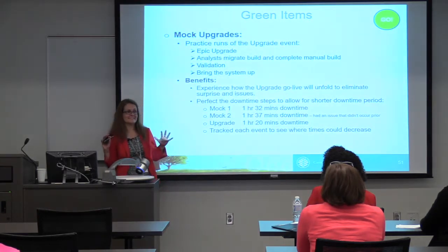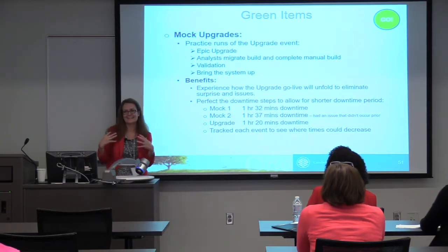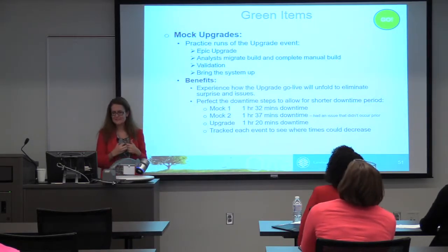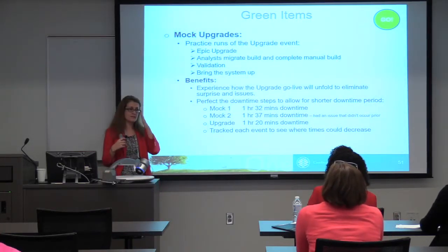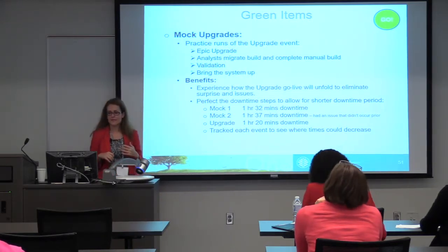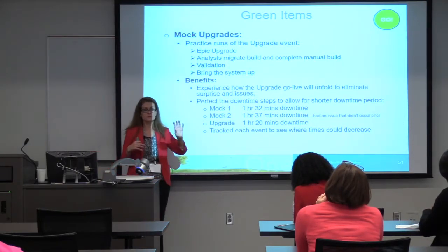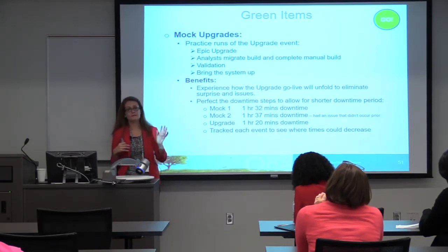Okay, so my last and favorite one that we did, I was over the upgrade, if you can't tell. I have a lot of attachment to it. So we did mock upgrades, which were practice upgrades. This is an EPIC recommendation. During these practice runs, we took one of our test environments that was on 2014. We brought the system down.